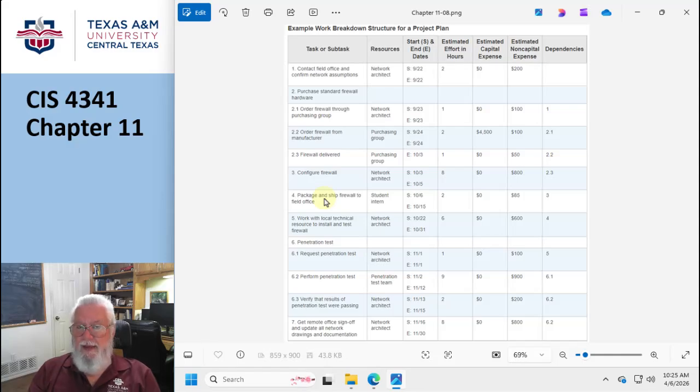Okay, and if you have a task out there with nobody assigned to it, it's probably not going to get done. Okay, so the assignments could be done by name, by Bob, or it could be talking about carpenters or finished carpenters or that kind of stuff. You don't have to give them their names. The number of man hours is clearly the number of workers times 8 hours a day, that kind of stuff. So it could be done like a resource pool.